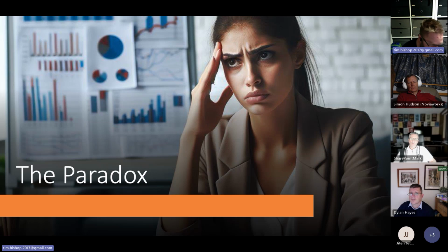Correct. And so we saw in our little control chart that we had a big lag time going to QA, and we saw that we were taking longer to do our tickets than we thought. That's a really great answer, by the way. So let's say we go in there and sort our flow out so that we're flowing much faster. But it might take a month to sort that flow out, so we're still going to be a third to a quarter of the way through the project. And because we've realized that we have been going slowly, we know we're still going to have to go very fast, because to get ourselves back on track and finish all the work we thought was going to take a year, we're going to have to both fix the shortfall that we've had and go much, much faster than we ever thought was possible. So how can we do that?